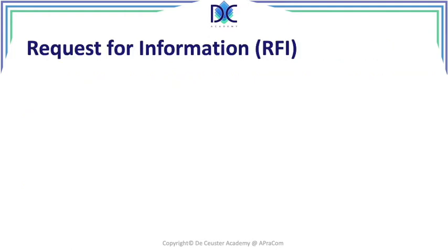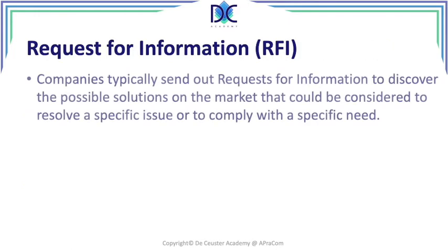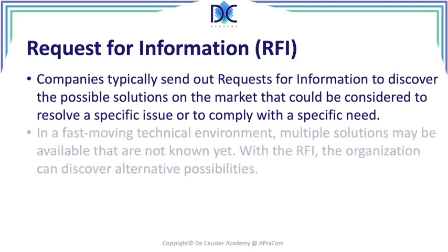So the first step that we have is a request for information. Here we are sending out requests to companies to discover what possible solutions are available on the market, and are those solutions applicable for what we want to do? Do they cover the needs we want to fulfill in completing the project?